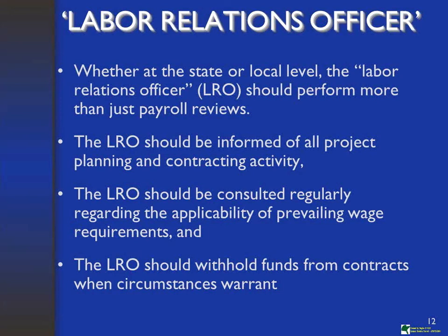Coincidentally, between competitive bidding and award, and I don't think it's in the slide, there's a 90-day window. You must award the contract or seek an extension within 90 days from bid opening to award. That's what we call lock in the wage decision.